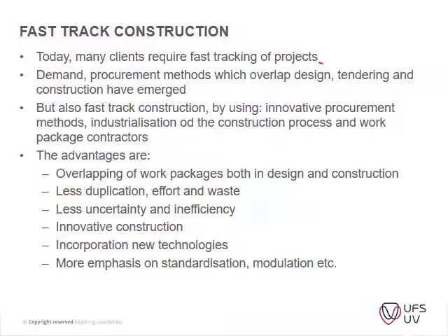Okay, so you have a procurement method which overlaps design, tendering, and construction, which have to merge. So the main thing is, while you're designing, you're already looking at procurement of certain sections. For instance, the drawings might not be complete yet, and you have to develop bills of quantities. I've had to do that quite a bit, where you have to draw up a bill of quantities.